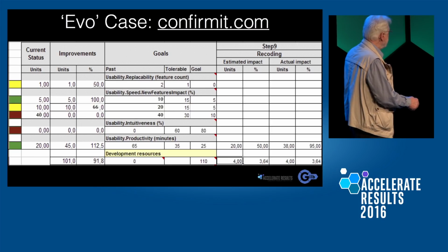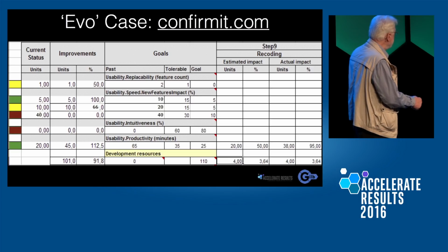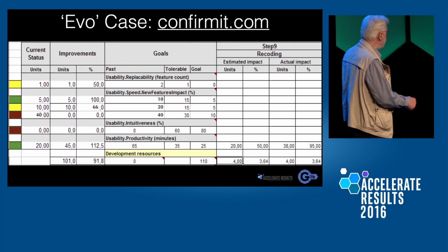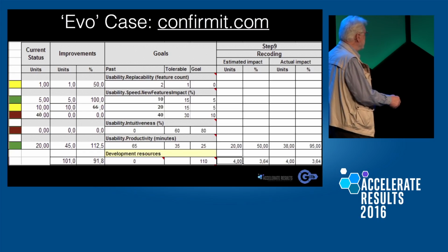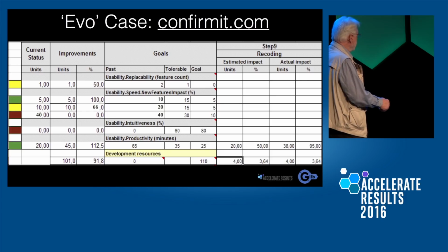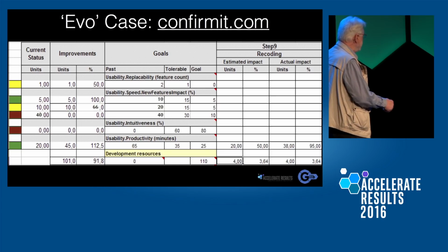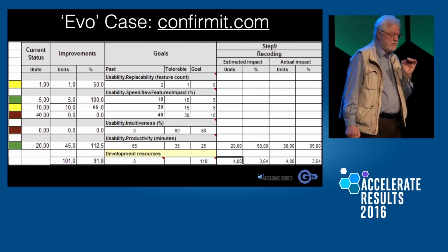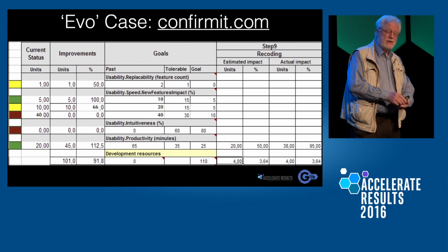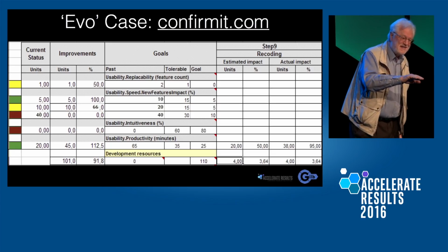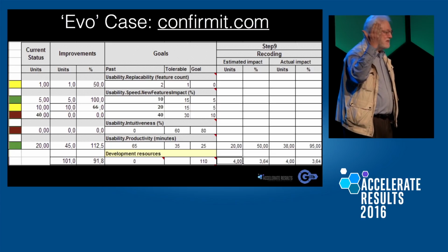This, by the way, at the end of week 9 of 12 is the progress to date. This means we've achieved half of that, all of that, 2/3 of that, none of that, none of that, and 112% of that. Okay? In fact, in 75% of the time, 9 out of 12 weeks, they had achieved an average of about 91.8% of the value delivered. This is totally different from a burn down chart. This is a value burn up chart or something like that.